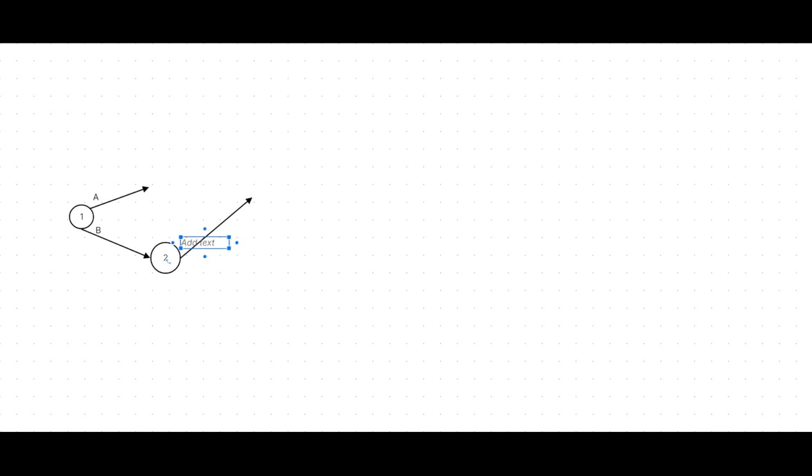What is the next? The question says for D, we should complete A and C both. Here A starts from event number 1, and C starts from event number 2. You remember that earlier I explained, if we start activities from separate events, we can finish all of them using the same event. Likewise, now we should change the direction.